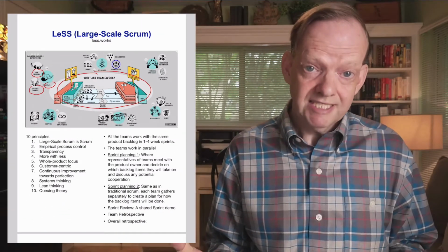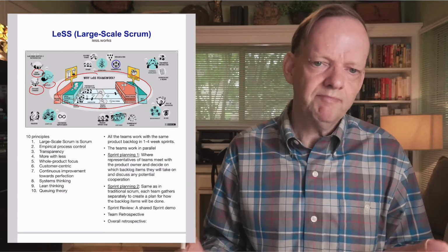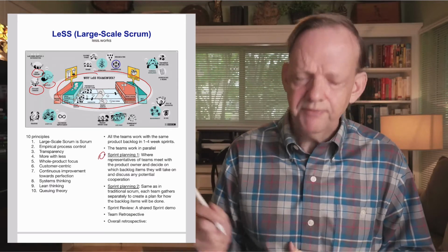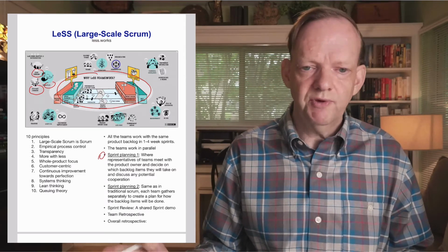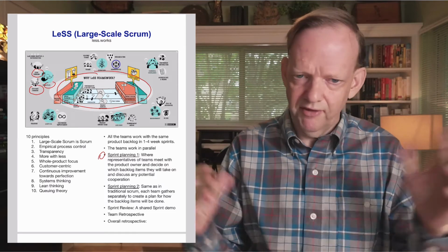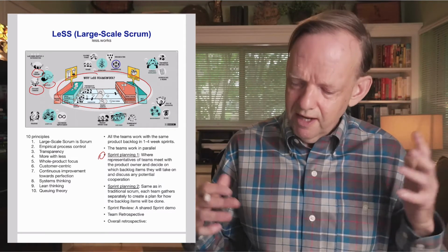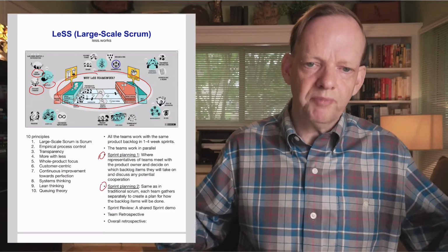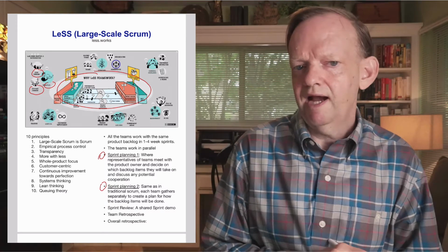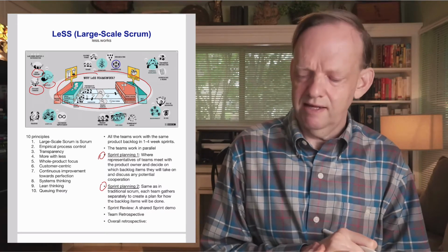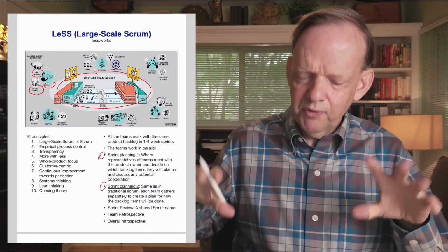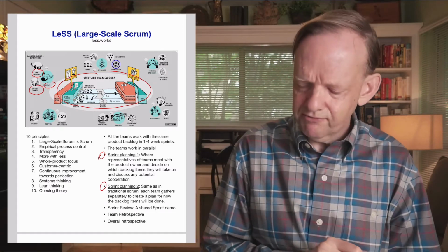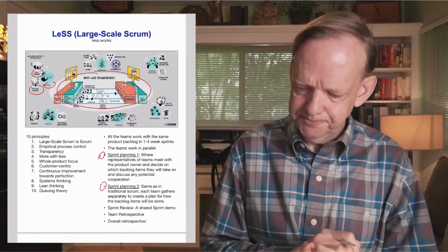And one thing I liked about it is that you could quickly get to some pragmatic steps you could do. For example, they have the sprint planning number 1 activity, where in a large scale project, you have all the stakeholders together and teams and figure out the bigger vision of what you want to do. And then sprint planning number 2 activity, where the teams go off and do their own local planning given the bigger context, and then come back together to figure out where they stand. So it was a quicker read and easy to get down to the detailed steps of what they recommend for scaling to a larger organization.